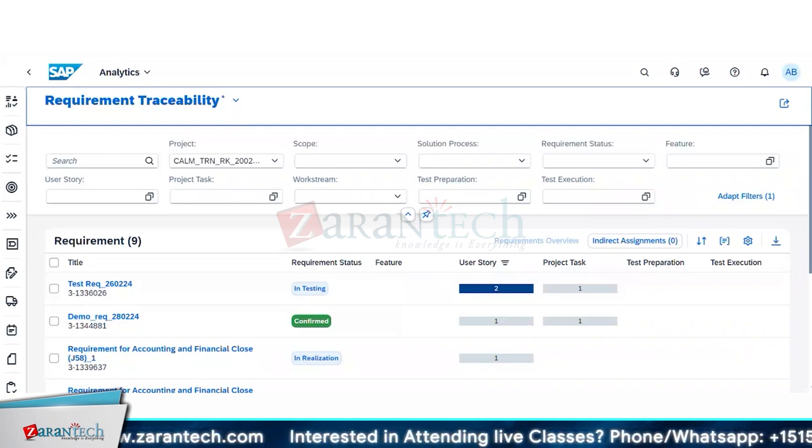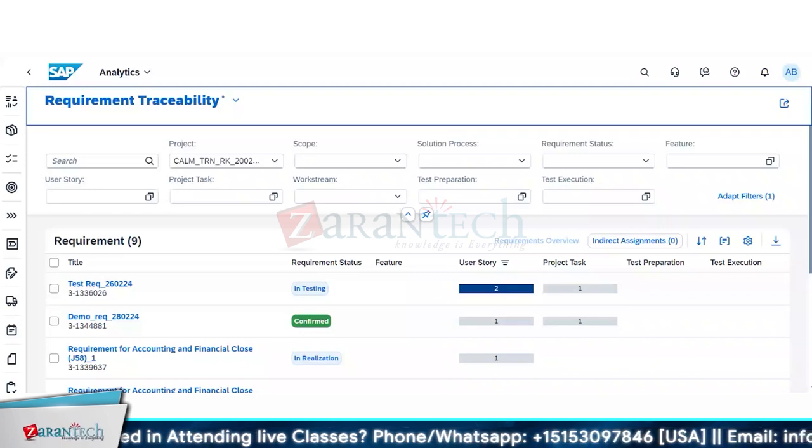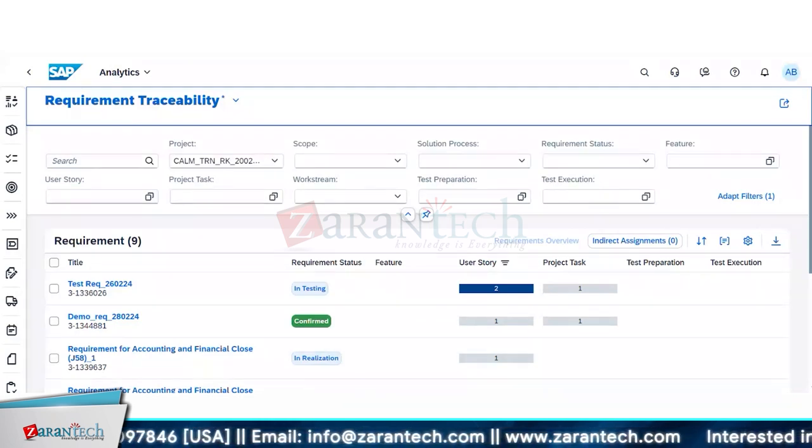The testing team, obviously with inputs from the workstream lead and, for a particular case, the developer, can find out what needs to be developed exactly. That can and should run in parallel so that you don't lose time between the two phases, where development is complete and ready for testing but your test preparation is not done. Then it will take some more time for the test team to create test cases.